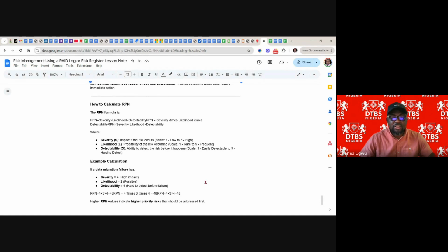If it's 50, then you say that the criticalness of any risk within 40 to 50 is critical, and between 25 to 40 is high, and between